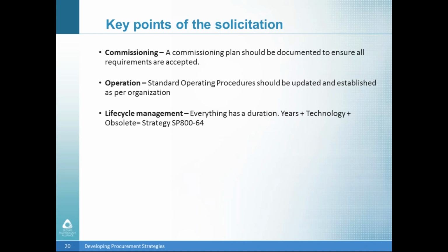So commissioning. At the end of every project, if you're a project manager, you know that you want to commission the project. So after you've tested everything, you should have a commissioning plan. Everybody should be on the same side. And this is basically where the government's going to assume the responsibility of taking the project from the contractor. We've vetted everything that looks right, and we say that we're good to go. The next point is a standard operating procedure.